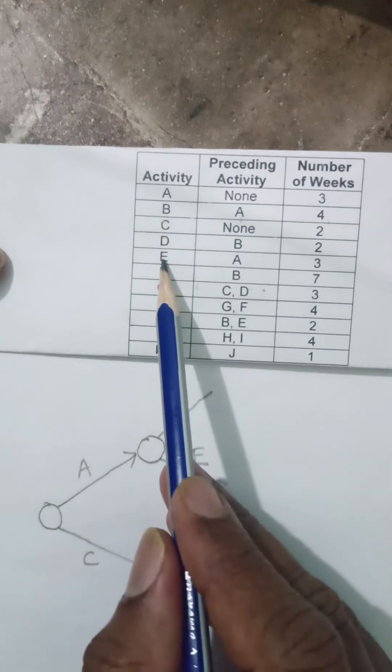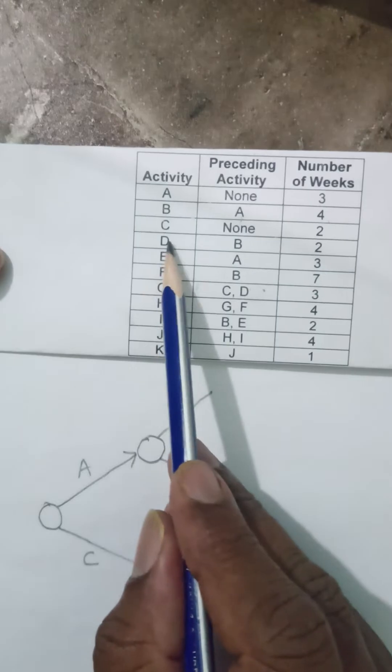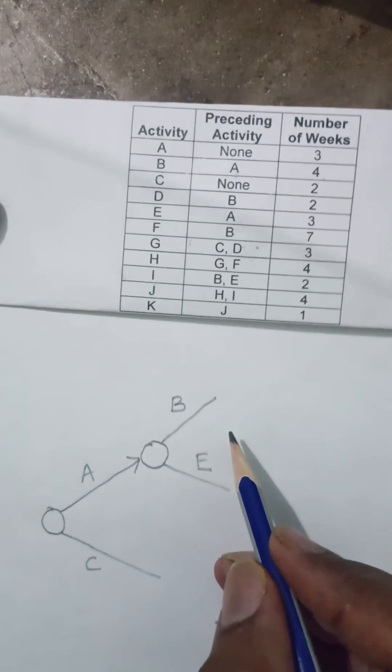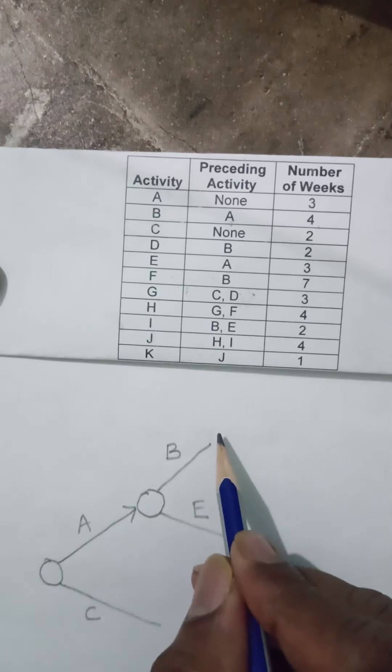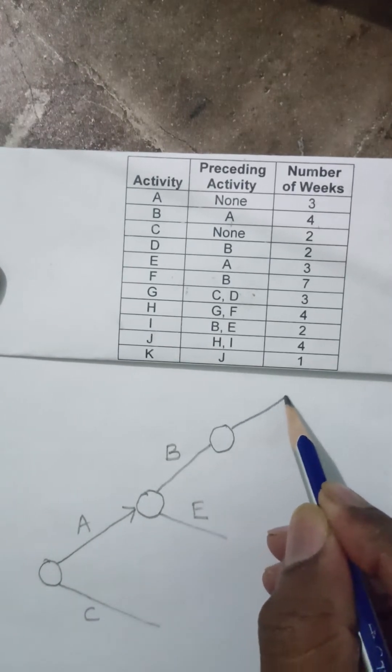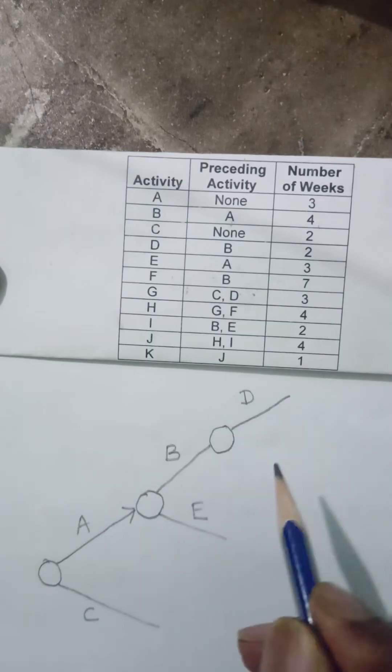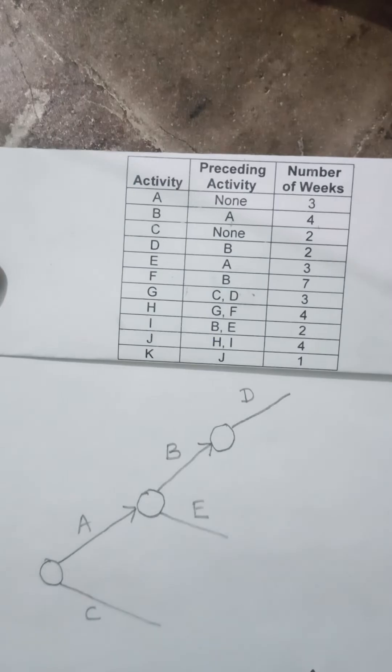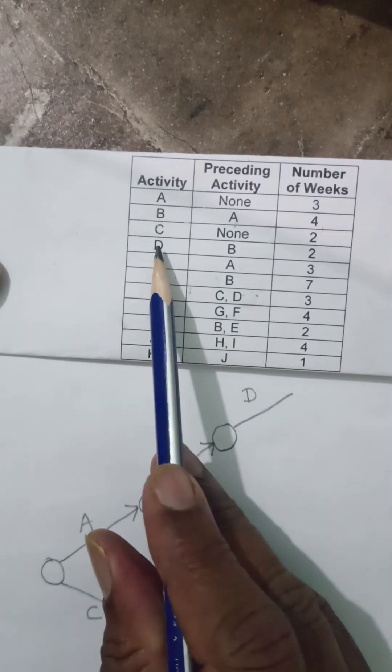I have done B, I have done E. Now D activity is after B. So I will start from B and maybe I will start activity D here. Whenever I start, then I can finish this activity by doing the arrow. I have come up to D.